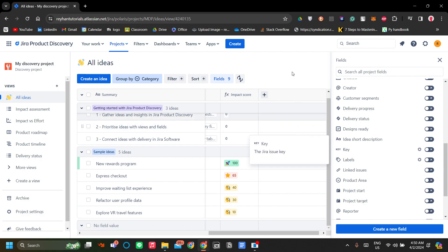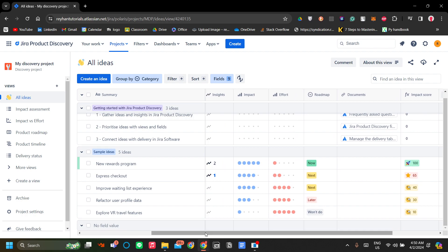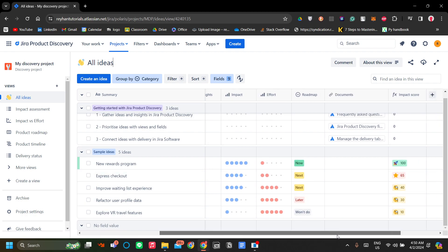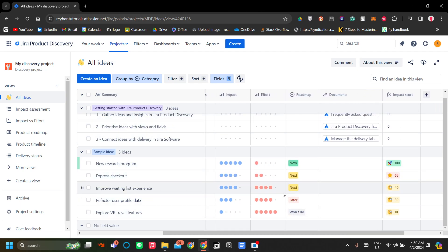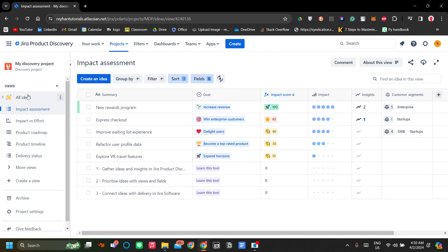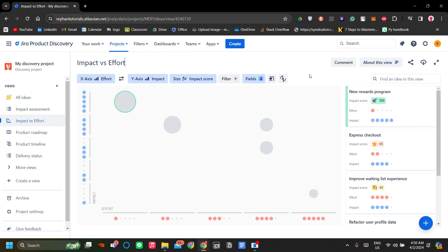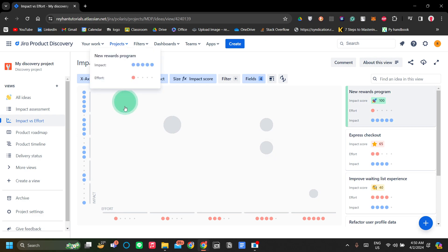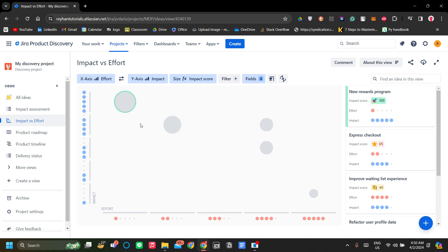Let's add an impact score field. The impact score is the ratio between impact and effort, and it helps you determine the priority of a new idea. If we go to the 'Impact Assessment' view, it has a more detailed view of your product ideas and their impact, giving you better information on priority. There's also an impact versus effort chart — the higher the idea and the more to the left it is, the higher the priority.